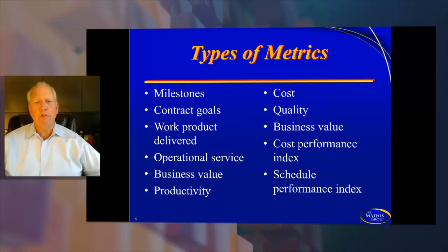So understanding how to interpret CPI and SPI, with 1 being where it should be perfectly, above 1 is good, below 1 is bad, and then you're able to interpret these indexes from the vendor, and you can have the vendor deliver those to you. In other words, if the vendor is constantly giving you 1.00 week after week and meeting after meeting, that's hot air, because that's not how a project runs. It will drop down to 0.94 and go up to 1.02, bouncing back and forth. So don't be ridiculous. Don't expect them to always deliver 1.00. It's going to fluctuate. But at the same time, it does give you something to be able to see whether or not something could be having a problem in the future.